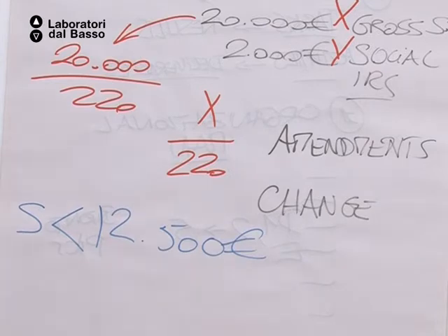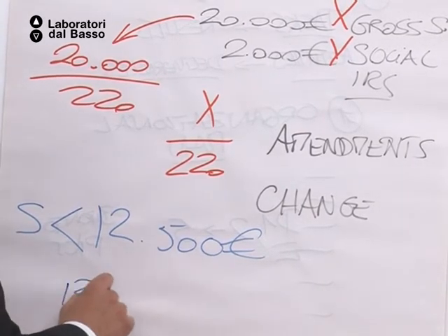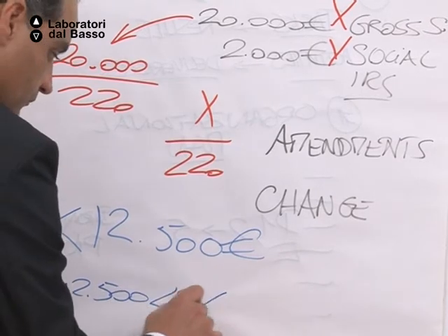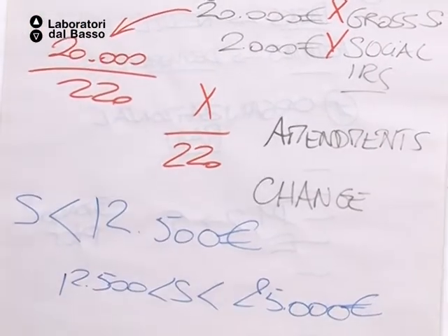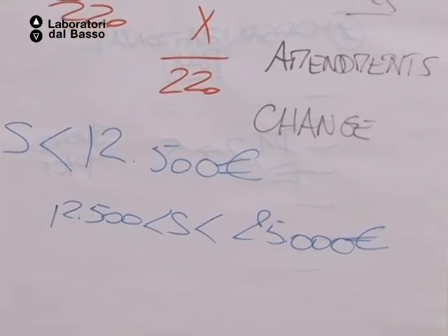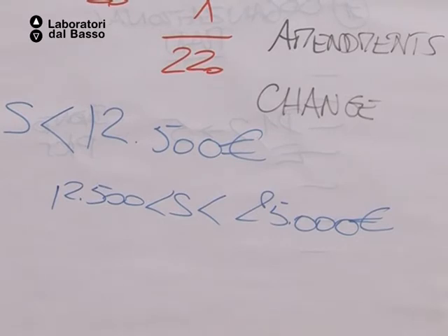If you go to 25, you will need 3 tenderers, meaning you will have to ask for 3 proposals. Actually, you ask for maybe 5 and you choose the three best ones. But you must prove that you had 3 tenderers to decide which one to give, the rationale, the justification, why you choose this one and not the other one.